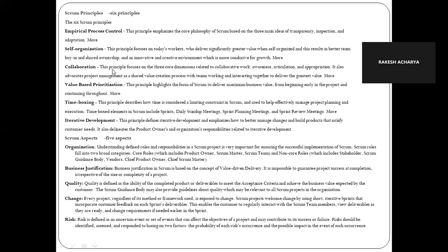Collaboration is nothing but it's kind of how you are discussing with your other team members and all, so that it will not impact your delivery. Value-based prioritization, you have the entire backlog, right? Now product backlog to sprint backlog, we are doing the conversion. How? There are 100 items, but out of 100 items, what are the first priority items that your product owner wants you to develop. So that is a value-based prioritization.